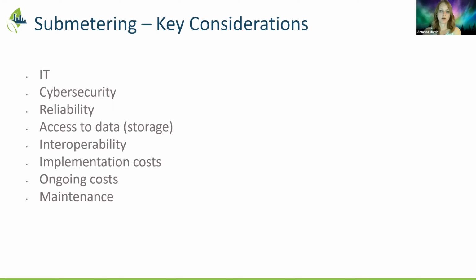Mm-hmm. I have a few pieces of advice that maybe you've already thought of, but maybe this will be a new idea. First would be developing an implementation plan with a solid business case: which are the target facilities that you want to start rolling out, and then gradually work away from there. It depends on what your priorities are. In our case, it was energy competitions, or if we have major retrofits planned and we want to do measurement and verification on it, then that would set those facilities a little higher in the priority scale.